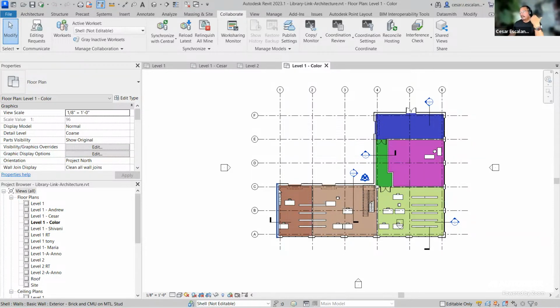And so I recommend to start breaking the model into two different models, maybe the west side and the south side. That's why you need to pay attention. This is something that needs to be discussed early in the project: how many users you anticipate to have access at the same time. And then you plan the number of models needed in the workshare environment. I can see all your contributions here.